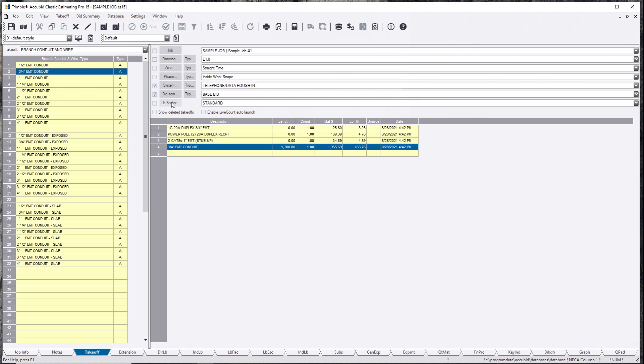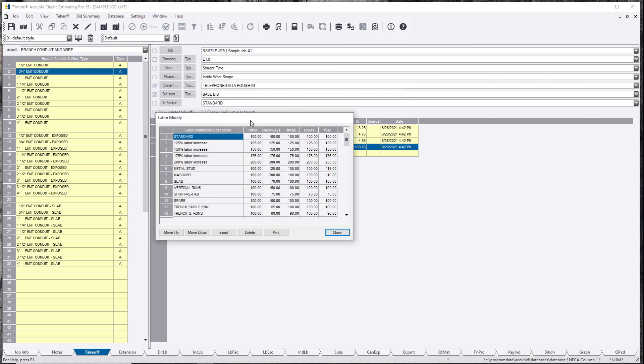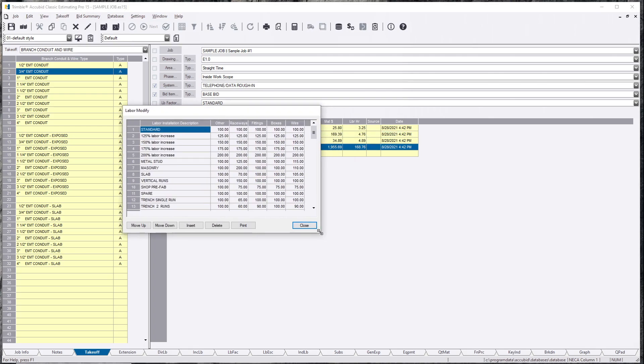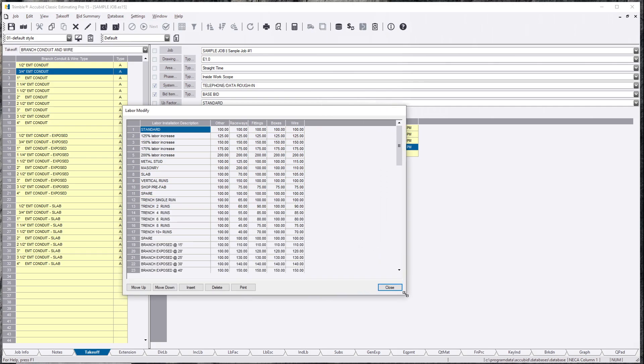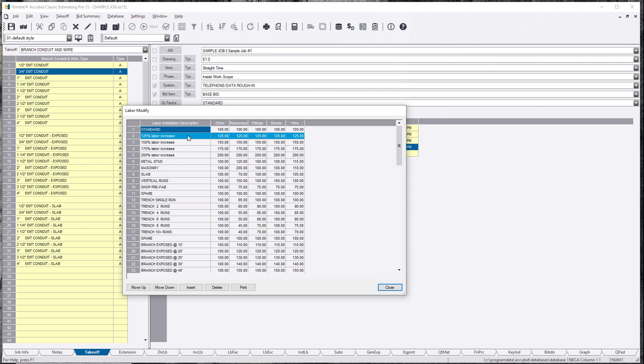There is an item here called labor factor, and this is why this is here. We know that this piece of conduit is going to take a lot longer than what we have in our labor units currently right now. There are many ways you can do this. You can increase this by 125 percent. There's going to be an extra 25 percent for the raceways, your fittings, boxes, but maybe not wire.